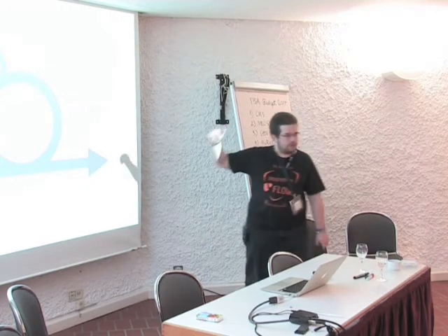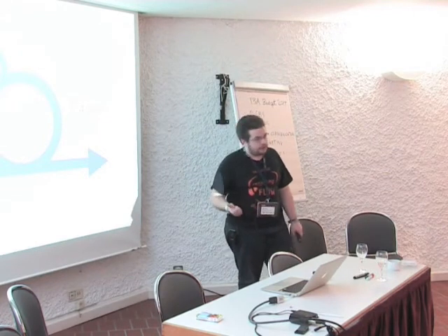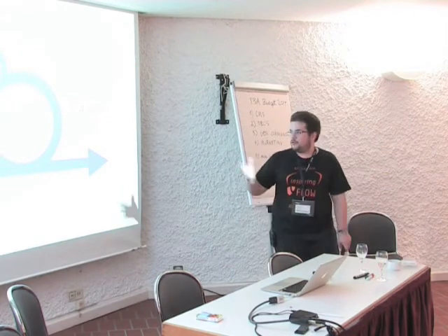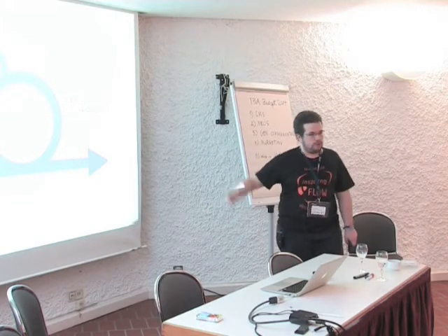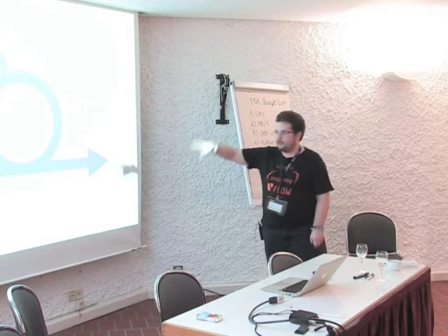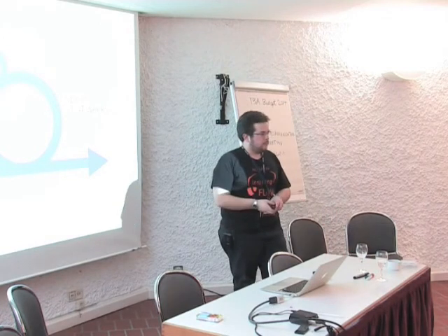And when the sprint is over, you use the story's acceptance criteria to check: are the stories actually complete? And then you begin at the beginning once more. You pick the next set of stories, put them into the sprint backlog, and so on, until your product is done.